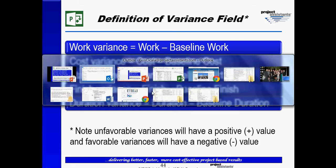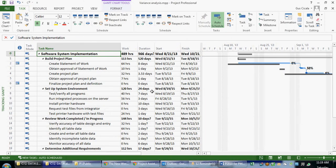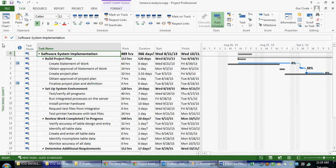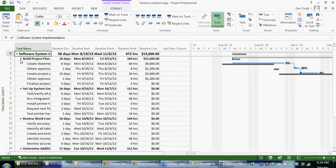Let's take a look at Microsoft Project. The first thing we want to do before we do variance analysis is confirm that our plan has been baselined. One of the ways we can validate that is to take a look at the baseline table. So I can right-mouse click on the Select All button above my ID column, and in this case I'm going to choose the baseline table. I can see here that the baselines have been set for this project.